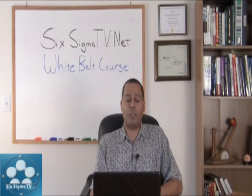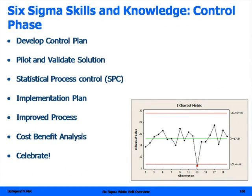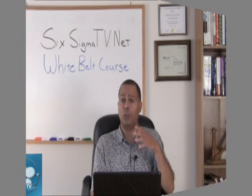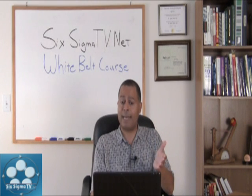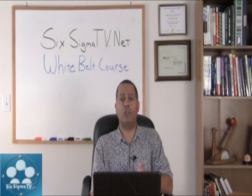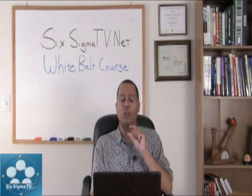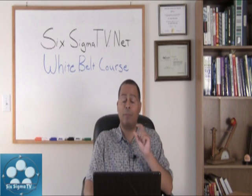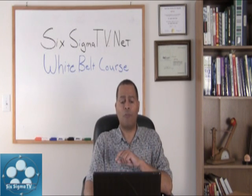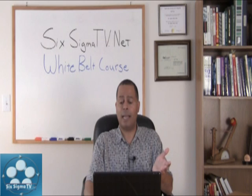So the steps that you're going to go through: you're going to develop your control plan in this phase, you're going to pilot and validate those solutions, you're going to use a tool called statistical process control to help you monitor where your new process is. You're going to do your new capability analysis from that pilot, your new standard deviations, your new defects per million opportunities — all those things that will let you know where the new process is. You're going to have an implementation plan for that improved process, do your cost-benefit analysis, and again, celebrate the success.